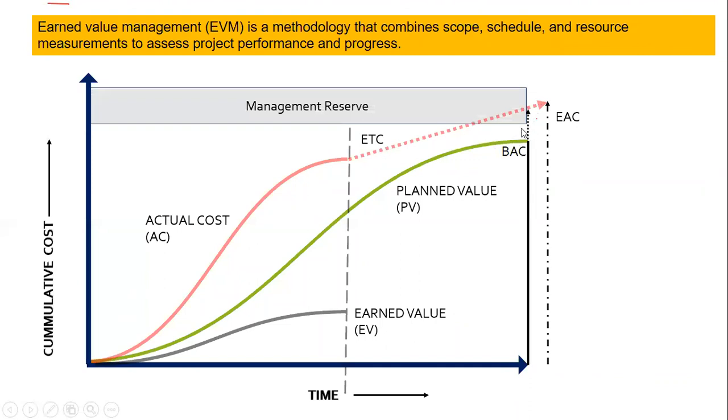They know that if management gives the project manager $1,000, he will definitely overrun. So they might have some reserve. They can allocate this money from reserve, or they can allocate this money by asking the customer for a CR, a change request in terms of cost. They can say that we are over on the budget and we need more money.